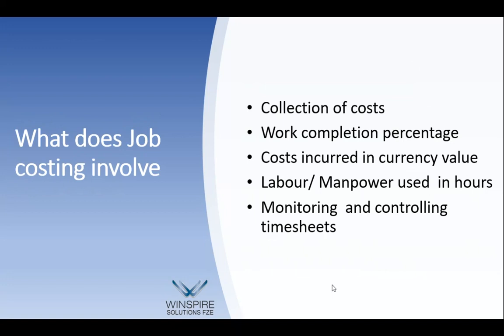What does job costing involve? Collection of cost. As I told you already, costs are coming from various quarters, from purchase, from timesheet, everything. So we need to collect all the costs and then make a proper entry into the system. Plus, based on the work completion percentage, we have to value the work completion based on surveyor certificate, or work completion percentage has to be booked into the system.